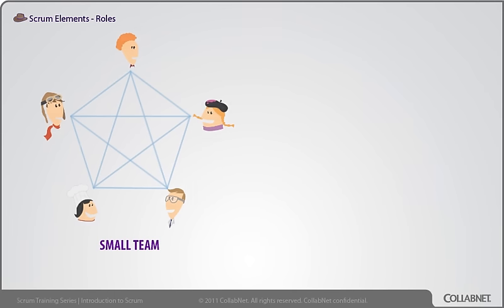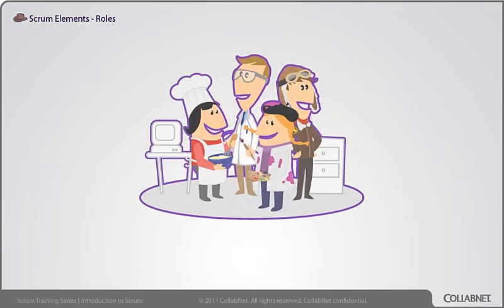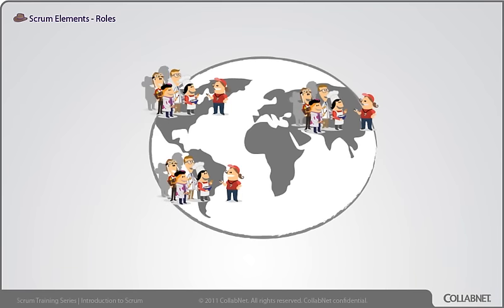The Scrum Development Team is a small group of people, ideally between four and nine. We have millions of years of practice dealing with groups about the size of a family. Large teams don't self-organize effectively until they've divided into smaller teams — ideally feature teams with minimal interdependencies. Team collaboration emerges most naturally in a team room. If your organization is spread around the world, you're probably already suffering poor collaboration. Scrum will quickly bring this problem to the surface, and you may experience breakthroughs by getting remote people into one room for one or two sprints initially and then every few months after that.